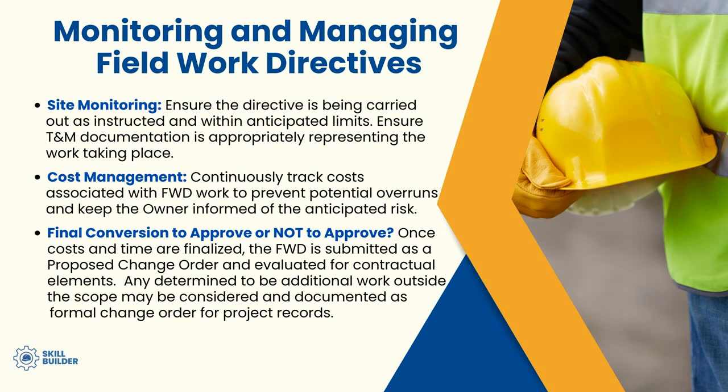Now, again, ideally, the whole purpose of a Field Work Directive is to work through the issues determining if this is a legitimate change to the scope or not, because we don't want the contractor to finish the work 100% complete before we let the contractor know whether or not we intend to reimburse or pay them for the effort that has been provided.